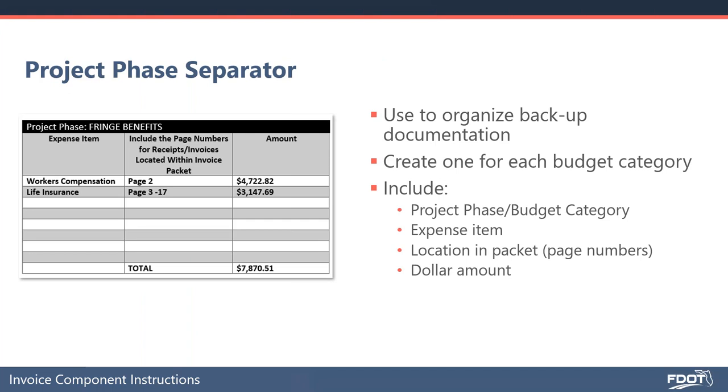I've mentioned to you guys a few times that we're not going to be submitting backup documentation to our district financial services, but let me be clear that this does not mean that we are not going to be expecting backup documentation from agencies with each invoice. We are going to keep that here at the transit level and be prepared for audits. When submitting your expense backup documentation, we have developed a project phase separator, which you're going to use as a cover sheet for each of your individual budget line items.